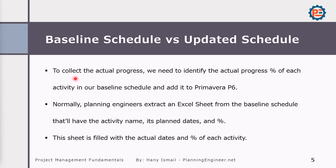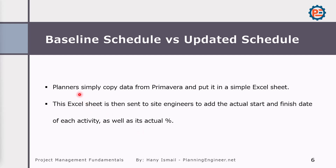To collect the actual progress, we need to identify the actual progress percentage of each activity in our baseline schedule, and then add it to Primavera P6. Normally, the planning engineer extracts an Excel sheet from the baseline schedule that will have the activity name, its planned dates, and the actual percentage. This sheet is then distributed to the site team to fill in. The planning engineer can also do this job themselves if they are site-based and the project is not very large.